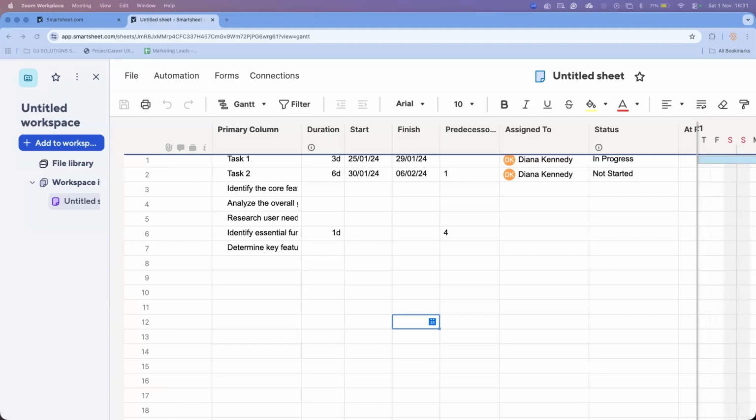The next one is a delay in EMR scope sign-off by clinical leads. As it says there, the EMR scope has been delayed because of a lack of current access. We don't have enough access in order to finish the EMR scope, so that's also causing a delay in the project. The mitigating action is to schedule one-on-one sessions with each clinical lead this week in order to gain specific access for the EMR project.